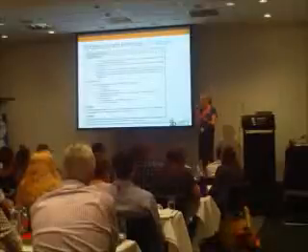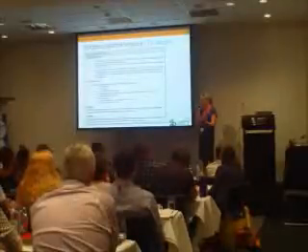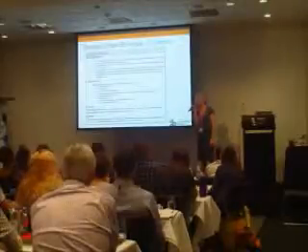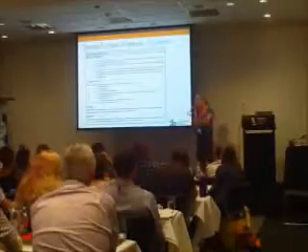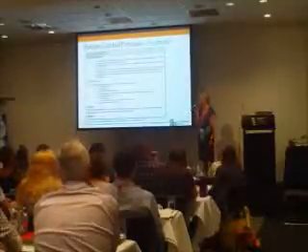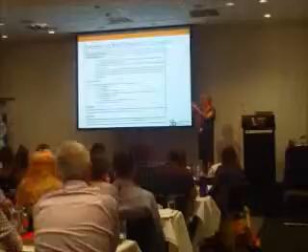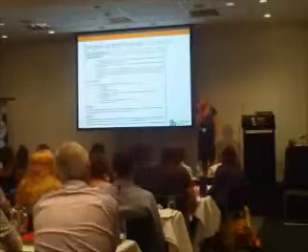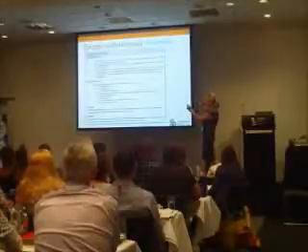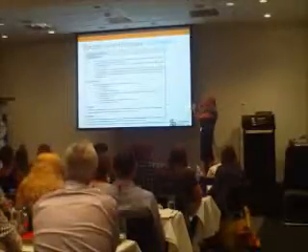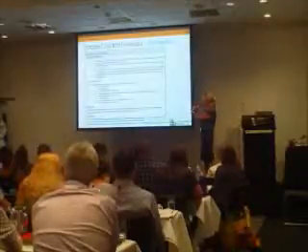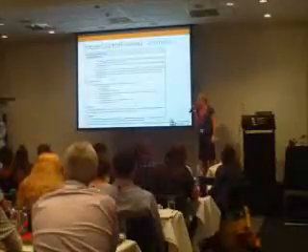We want to get that happening. What steps could Matthew then take, or what steps could you take? Provide a business plan. You could do a business plan, or you could do a business case for it, yeah? It doesn't have to be a big thing, it could be a paragraph really. So you go through the process, you identify what the change is, you evaluate how it will affect all of these areas, you propose your solution, and you put in a form for approval, which would be a variation request form.